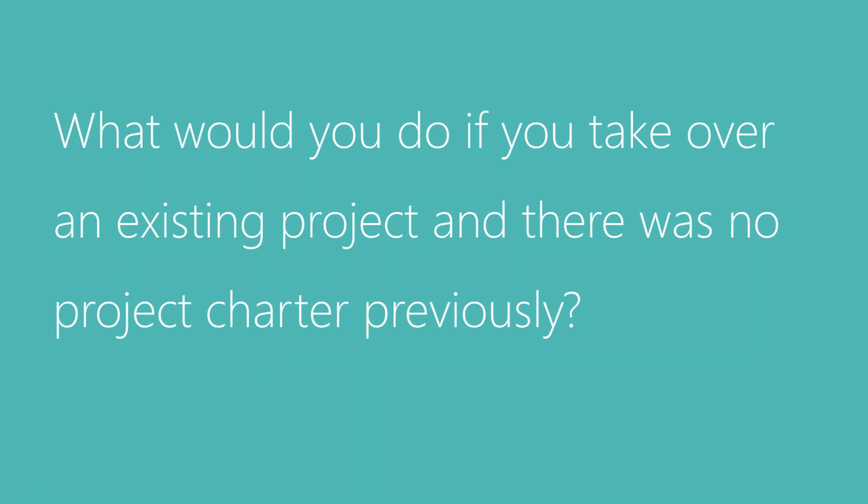Has anybody had any experience where there was no charter and you had to go into a project, maybe take over an existing project, there wasn't any charter? Did you use a charter or some other tool to start the dialogue and a conversation? How did it work? I find personally, while we're waiting for any feedback, that it works very well. And to be honest, there's two main reasons in my experience projects fail. There's many, but the top two seem to be stakeholder communication and lack of clarity on what the project is. And so I think going through the discussion and using the project charter as a tool really covers both, because you're really listening to the stakeholder and the sponsor.